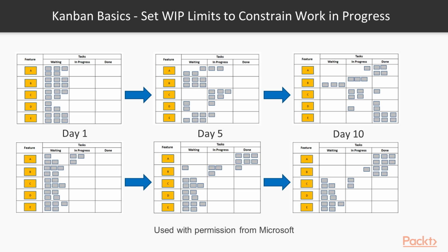So what happens when it gets the 10th day? So this is traditionally when people do set their 2-week sprints. If we look at what the top team's done, they've managed to deliver E, but E's the least valuable item based on priority, and they're still halfway through most of the other activities. And some are done, some bits aren't. So this is a real problem. How can you measure the value of what's been delivered here?